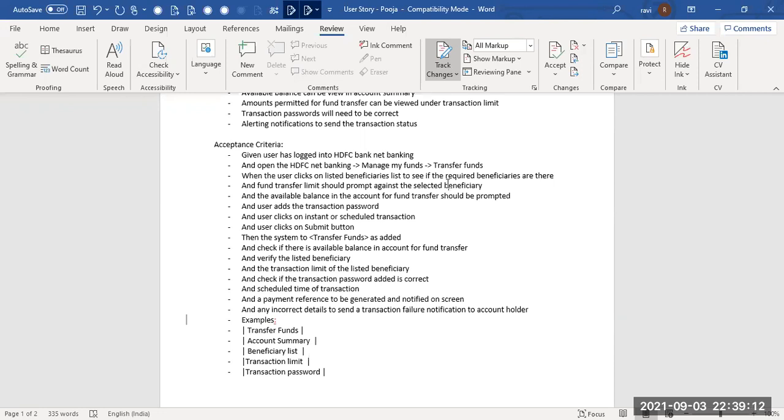So that's the first thing. Second thing is, if we have a large user story, we'll not be able to move it to done on a daily basis, so there'll be a lot of uncertainty. Which is why it's good to slice the user story into smaller requirements.